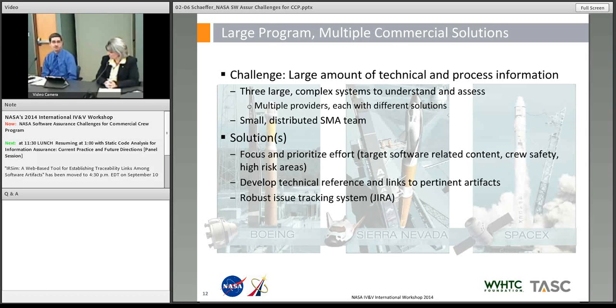And we are also generating a lot of information to match what we're receiving. So we implemented the use of an issue tracking system as well as a task tracking system within JIRA. Fairly robust, it helps us manage those 700 comments throughout these phases, and was critical to our success, just to be able to generate outputs when needed on the fly.